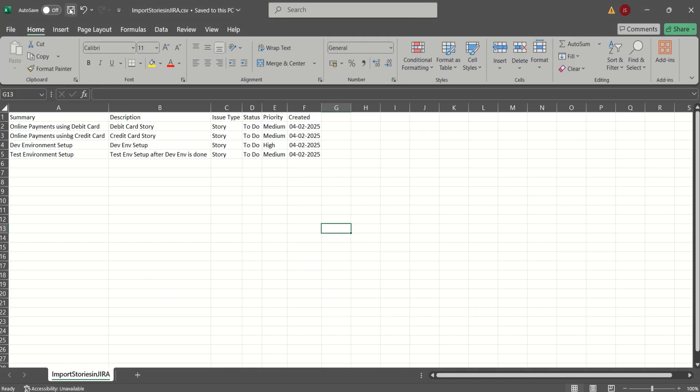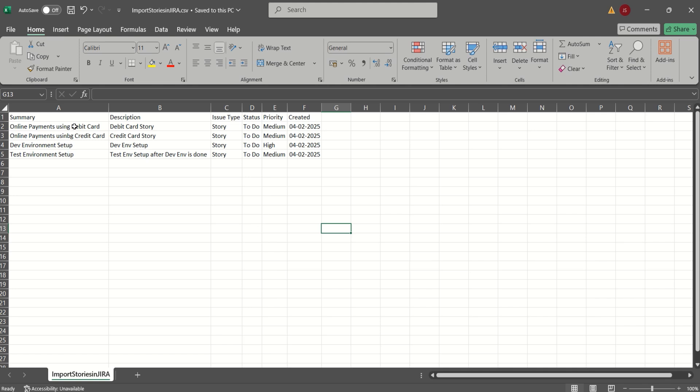So this is our sample CSV file, which is import stories in Jira. And we have the very first line defined as a header. We have a summary header, we have a description, the issue type, status, priority, and created. So this is how we have placed the four stories in this CSV file.